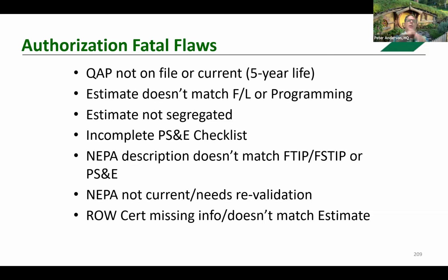There is a way to deal with that, and that is to create one single line on the estimating tool that is the total cost of all the items. Just say construction, lump sum it, and put the totals in there. And if you need to segregate, move it into the different columns. That allows you then to put in your contingencies and still use these checks and balances between the estimating tool and the project funding section.